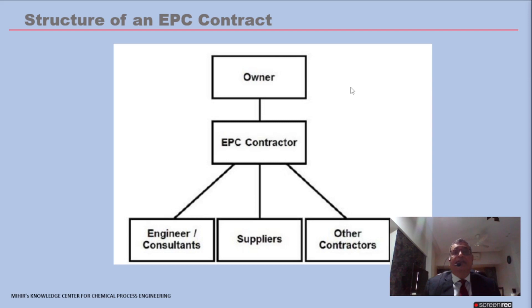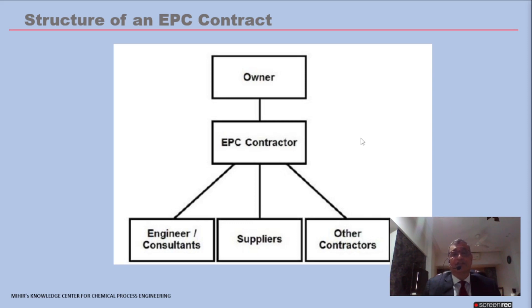In the EPC contract, the P&ID finalized at the budgetary pre-bid stage must be engineered further. The P&ID must be fit for purpose — gold plating must be minimized. Once the EPC contract is awarded, changes and gold plating on the P&ID must be kept to a minimum by the process engineer so that costs do not overrun the estimate from the previous stage.